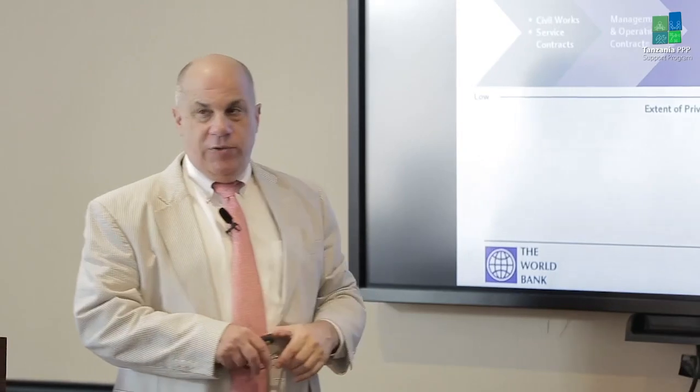So we had a proposed form of contract. We thought this really made sense as a really full public-private partnership where we would like the private partner to design it, build it, finance it, operate and maintain it. Right? They would do all those things. And the market, by the way, what we heard from, at least witnessed with unsolicited proposals, they all had the capacity to do that.